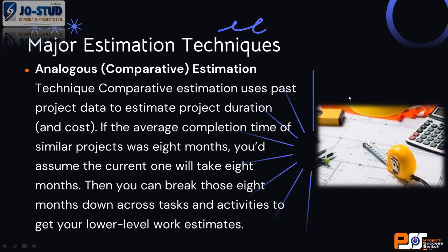It is not good to deploy to site with an analogous estimate. You cannot deploy to site with an analogous estimate, especially on very large projects. But for a very small project, I've done it. I'm going to give you an example later. You can do it for very, very small projects. You can mobilize with an analogous estimate. In short, some clients will actually tell you that you don't need a QS, just do this. I'll talk about that later. It's part of the scope of the class.